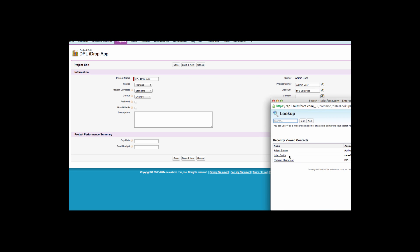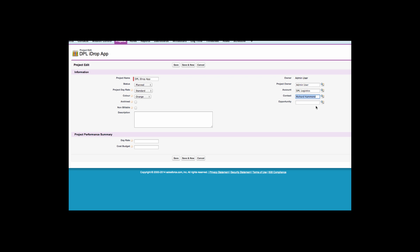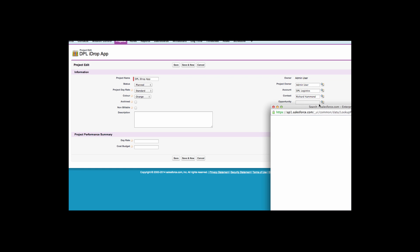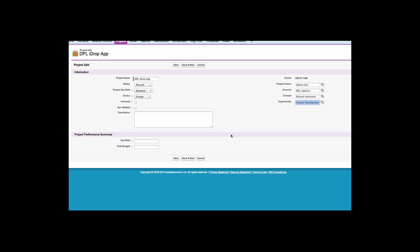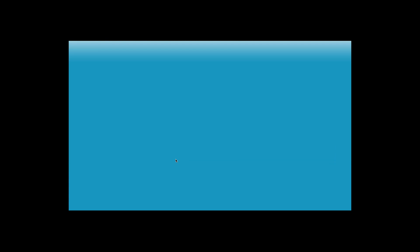A project can be assigned to a project owner and also related to account, contact and opportunity records. The project day rate can be based on a standard rate across the whole project or it can be based on an hourly rate of individual action owners.